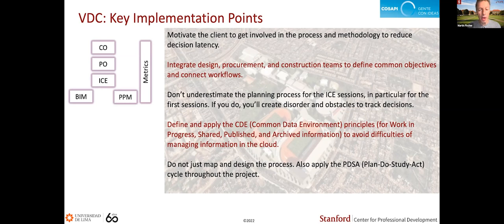Then the importance of working with a common data environment and finding ways of being very clear about the status of the information and how it's organized and how it flows in the cloud. And to not only map the process, but also really work with the process, track it, measure it, do truly PDSA, plan, do, study, act cycles throughout the process, throughout the project to get better.